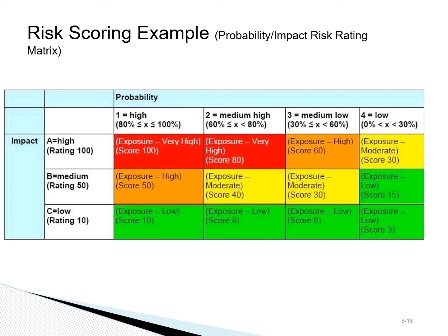And as you can see, they have different scores attached to different categories. So, for example, if you have a risk with high impact and medium, low probability of occurrence, then the risk is categorized as high with a score of 60.